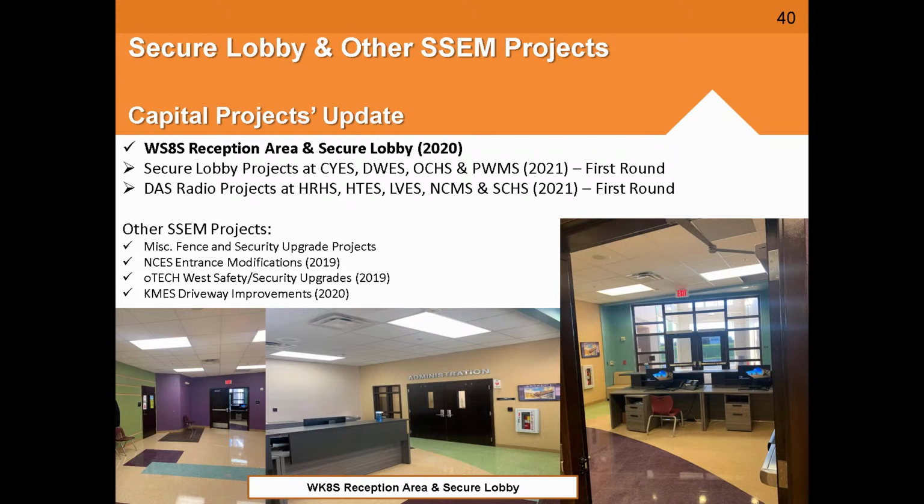We used that study as the first step of a design build process where you get the design criteria and you use that design criteria then to do a design build with a turnkey vendor. We just had that CCNA selection, and we've selected Radio One as that vendor that's going to go through and accomplish all of these corrections at these 22 facilities. And basically, it depends on the number of buildings that you have and the number of stories that you have, how you tackle the problem.